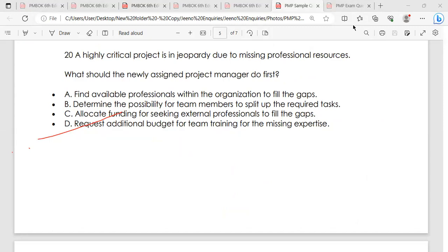Yes, we are considering the third one, because the building is a tangible thing. You can touch it and feel it, right? And you can see there is a big crack. A hairline crack is allowable to some extent in civil engineering, right? But you can see a big tree growing there. Will the customer accept this? No. You are the owner. If I'm a contractor and I give you this room with a tree growing in the gap, will you accept that? You'll do the house survey. You will ask me to do the repair, right? So the recommendation from your side will be a defect repair type of recommendation, because you need to buy the additional cement, you need to buy the additional epoxy, and you need to call the mason for his rework, right or not?